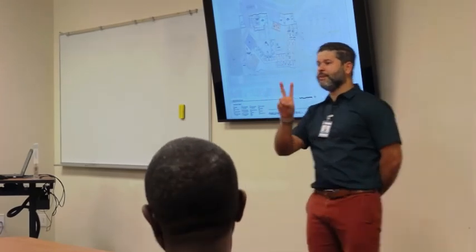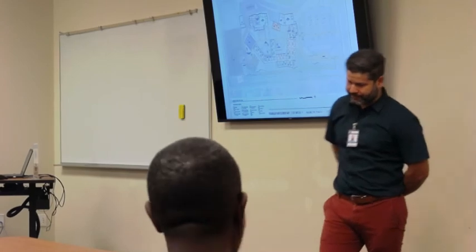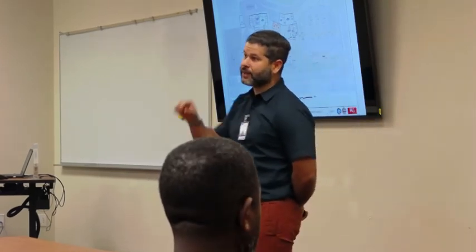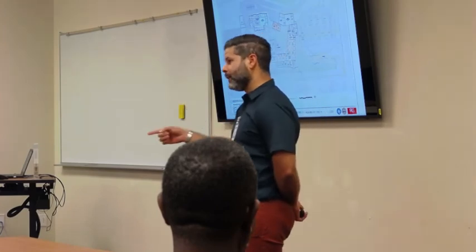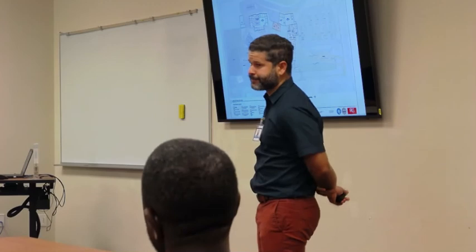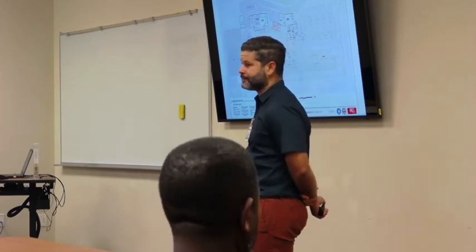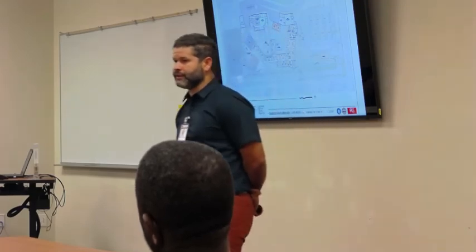So the two main challenges with the requirement from section 45325, the building code, is the elevation, as you mentioned, and then the wind criteria that has to meet ICC 500, which is 200 miles. Are we still building it 3 foot above the? Correct. We build all of our schools 1 foot above the 100 year event regardless of shelter or not. So this is one more foot. Going with full ICC 500, we have to throw that next foot on top of there, and dirt isn't cheap.